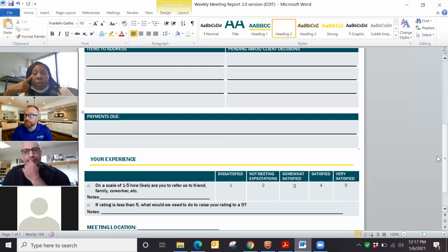Absolutely. A very good example of that is at Segal. There were times when the client's understanding of the scope was very different from what we had. They'd say, well, Nina told us this was included. And I'm looking at the contract and the AWO and saying, no, it's not. So that there's no he said, she said, I would get Nina in that meeting. We would all sit at the table together and figure out, okay, this is what the contract says. Why do you believe that this is in the scope? Or is there a conversation that happened that wasn't documented? And then we all figure it out together.